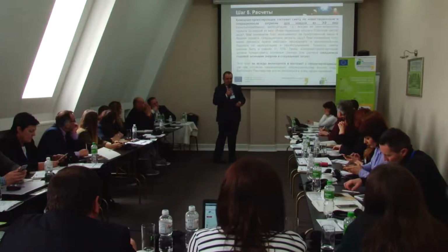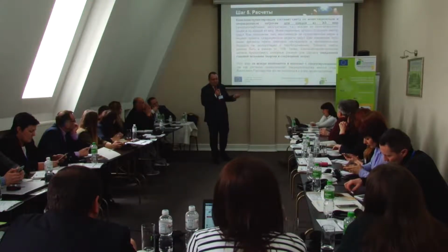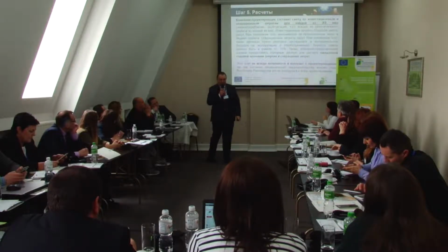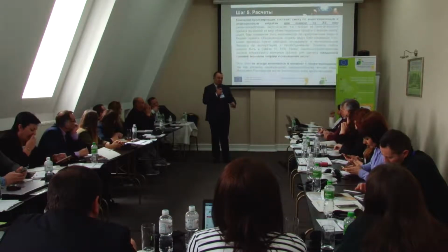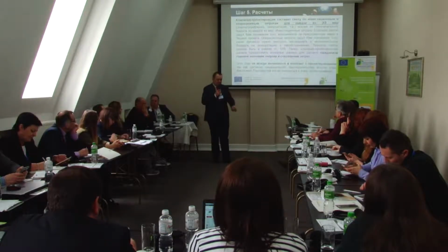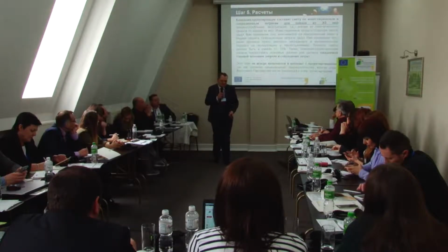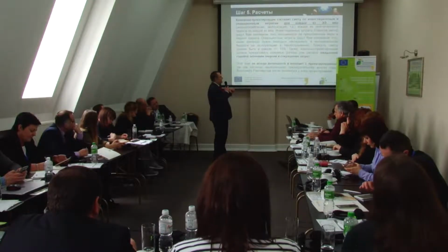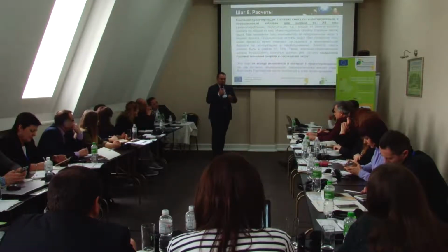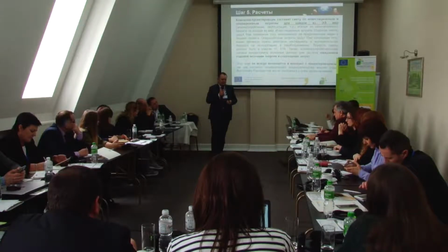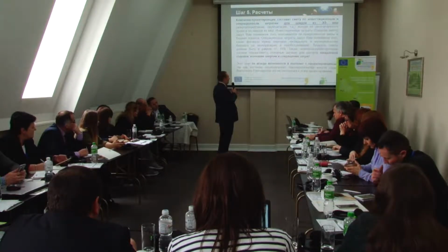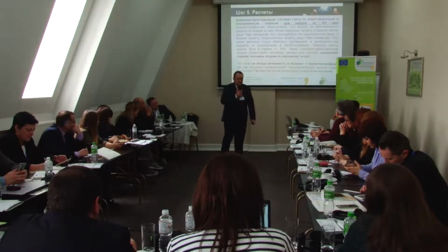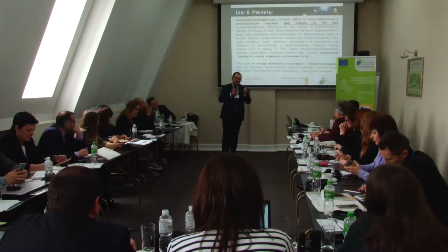That's why, on the basis of these more accurate figures, the designer or the energy auditor or the project team must provide updated results of saving, because the designer has already suggested a specific lamp with specific technical parameters. If we're speaking about street lighting system projects, they may already have very clear, accurate figures within plus minus 15 or even 10%. Why am I stressing this?